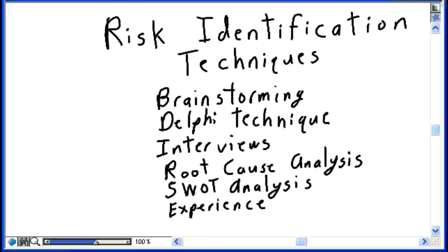While it's wonderful to have a list of risk categories such as technology, human resources, etc., how do you really go about doing a risk identification? Where do you find the risks? How do you find the risks on your project? Suggestions may be brainstorming. Work with your team. Have a whiteboard session where you simply say, team members, where are the risks? How is this project going to be impacted? Do a blue sky session where any and all possibilities are acceptable, and then go through and do further analysis to determine which are realistic risks, which are probable risks, and which can be dismissed.